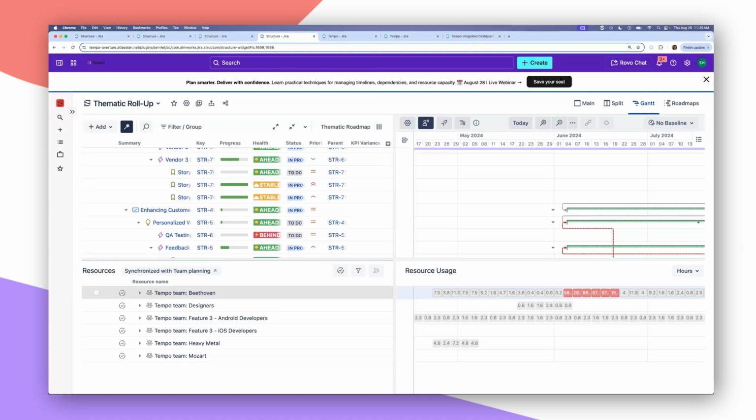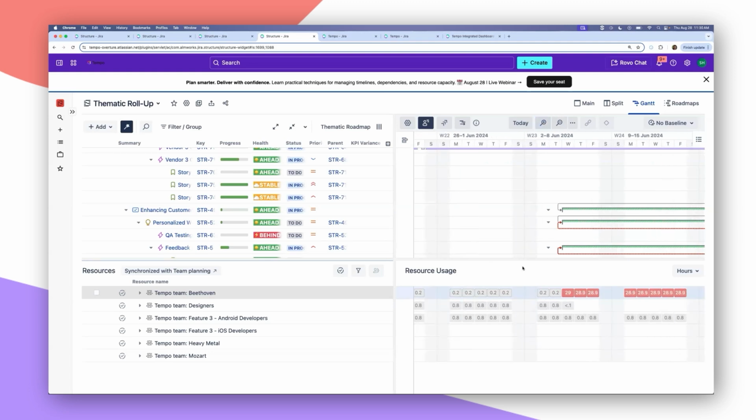At the highest level, I can see capacity across multiple different teams. This gives leaders a quick way to spot which teams may be overbooked or underutilized. And we can see that with the stoplight colors. So you'll notice that red means they are over allocated, they've been assigned more work than they can realistically complete in that time frame, right? And with this, I can drill down from months and keep going into the week of how much time is planned for each team here.